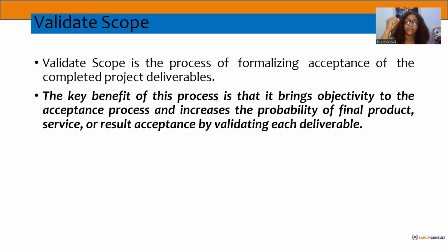So when you do that, at the end of the day, you make sure you validate that scope. Present through maybe presentations, experimentations, inspections, and that's what we do in the Agile. We call it review. We review it for the stakeholders to come in and give us their formal approval, whether it has met the need, or if they want any kind of adjustment or any kind of feedback, we're able to adjust to those. That's what adaptability means. We'll see more in Agile, okay?